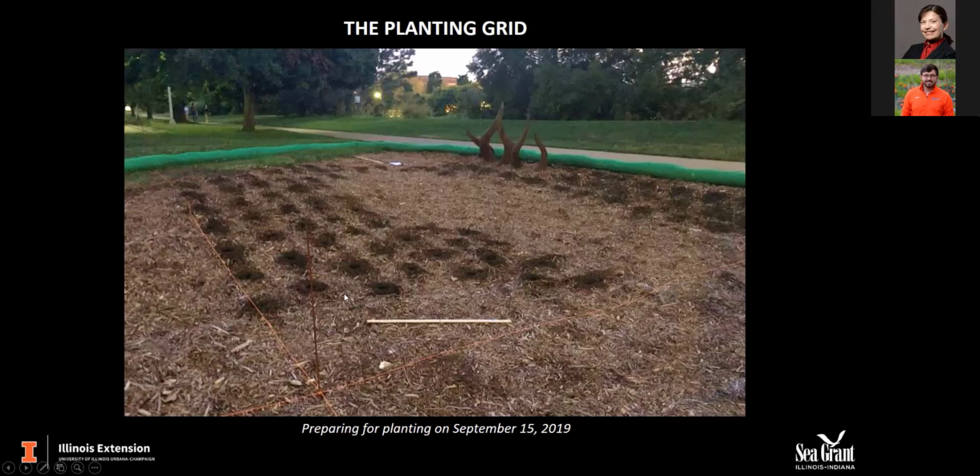A lot of times as our native plants are coming up, there are other weeds that look similar to them. So basically, if there was a plant that was on this grid, more than likely it was a plant that needed to stay. But say you had a plant that came up here where my cursor is at, that was probably going to be a weed. And so a volunteer would be able to identify that fairly easily and get that pulled. And it works really nicely.